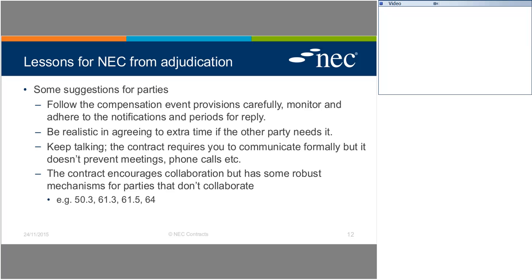In this contract, with clauses 13.1 and 13.7, you are required to communicate in a form that can be read, copied and recorded. Notifications are to be separate from other communications, but that still doesn't stop you ringing someone up, sitting down, having a cup of coffee with them and talking through things.